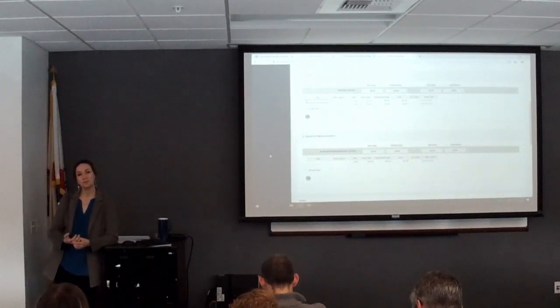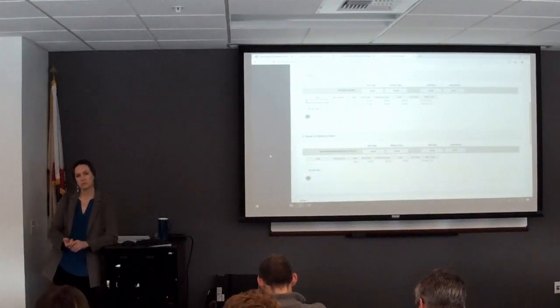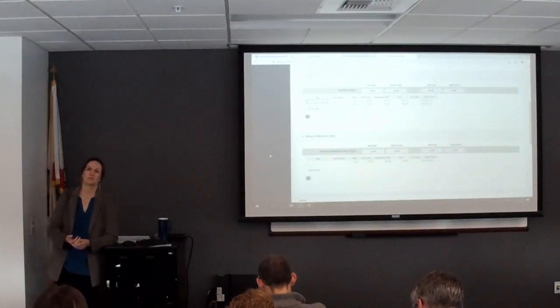We come in a project and say the project commitment is $5 million for this fiscal year for an OTC. They get into it, they know that it's probably going, when things get into the quotes and things have changed really quickly lately, that it actually turns out to be an $8 million project. This has happened on a couple OTCs in the past. They could come back in with the same application for the other $3 million.